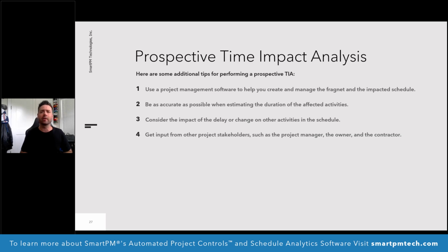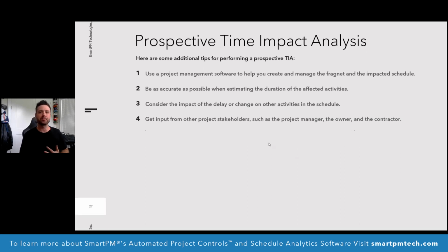Consider, like I said, the impact on the activities in your schedule. If it's a weather event, you're probably only going to want to affect the weather-susceptible activities, right? Those outdoor activities. And finally, get everybody in a room. Let's talk about this. Let's work through it. Let's be collaborative, and let's not try and railroad this situation.